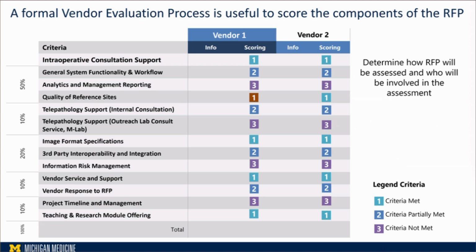This is a sample we shared with you right now of literally hundreds of questions that we had, from technical and clinical. But I tried to share with you: we put some weighing criteria, criteria met, criteria partially met, criteria not met, and then we put a weighing criteria about the importance of the criteria that we need, and multiple vendors that you can rank them. After the rank, you can find the upper vendor and the lower according to their rank.